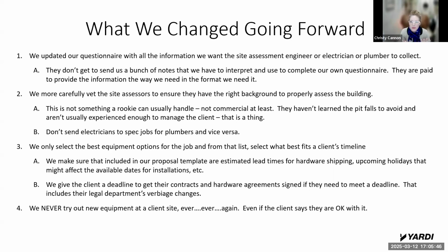You know what? We let them know for their timeline. We're very clear up front. Hey, look, if you want to have this equipment installed, here's the average hardware lead time. Your legal department, we have to have a signature on this contract by this date in order to get this done. If it's not done, then I'm sorry, we can't meet your deadline. And we let them know that 6 months ahead of time.